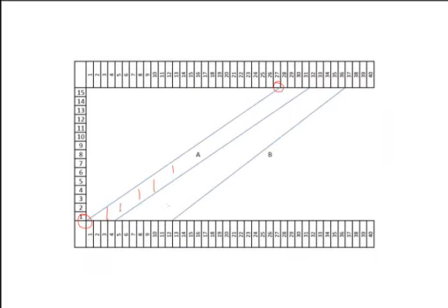The next line that we have to add in starts on day number 4, and we know what the duration for that activity is going to be, so the end date sits over there at 31. Just some more information on activity B. We know that it starts on day number 12 and that it finishes on day number 36, and that's from the calculation that we've made, and therefore there's that difference over there, the 5 days that I've given you. So this is just the first step.